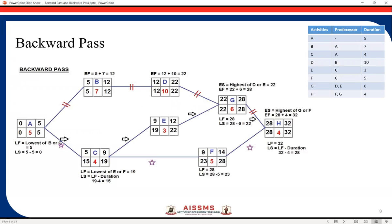Now we'll carry out the backward pass for the same example used in the previous video for the forward pass. Looking at the diagram, which contains all the values of forward pass and backward pass, we move from right to left. We take the last activity first. The early finish for this activity is 32, so we take LF = 32.